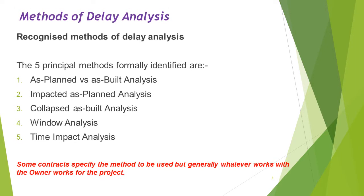There are five principal methods: the As Planned versus As Built analysis; an Impacted As Planned analysis; Collapsed As Built analysis; a Window analysis; and a Time Impact analysis. It should be noted that some contracts in fact specify the method to be used, but it can generally be said that whatever method works for the owner works for the project.